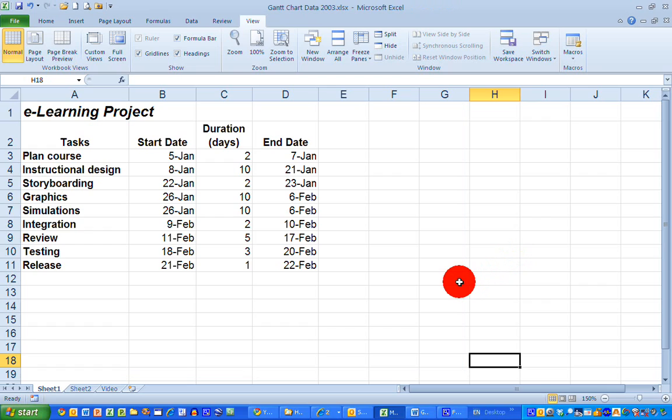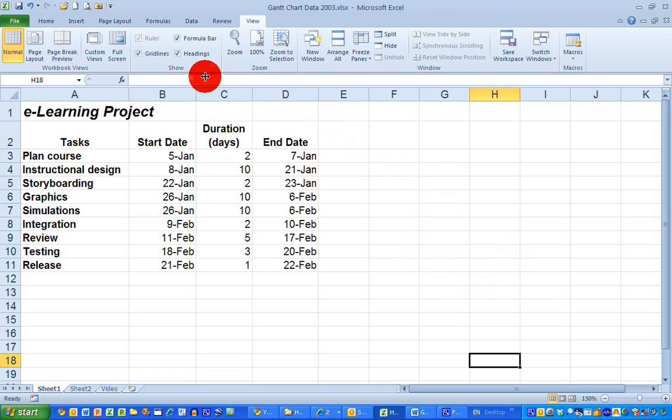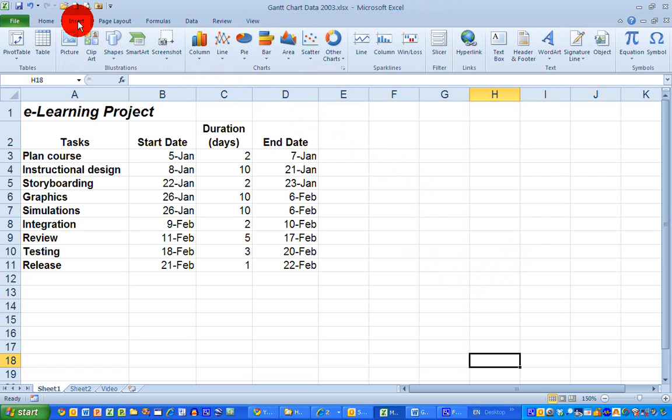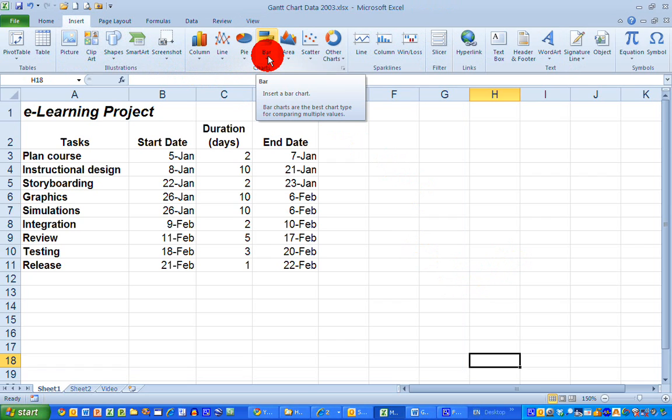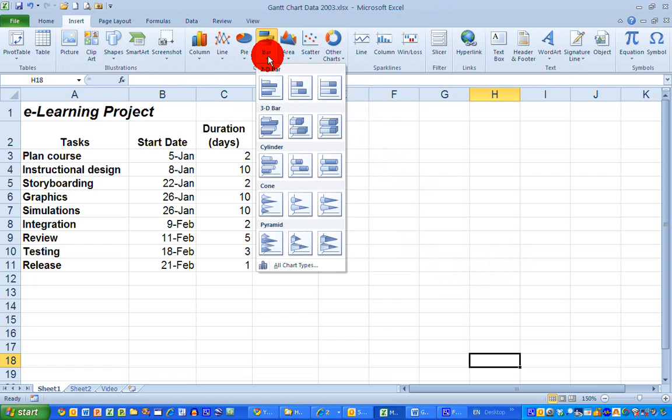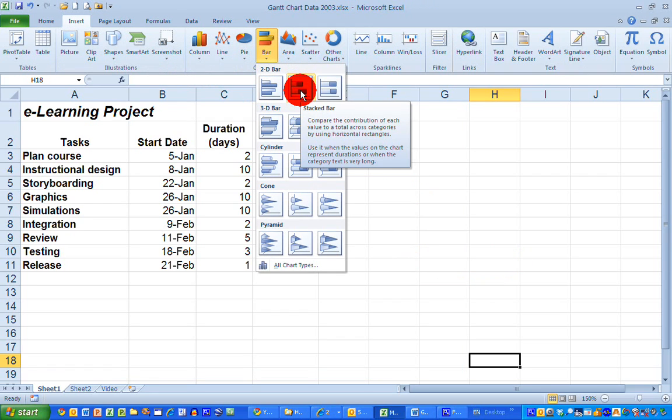So the first thing I need to do is create the chart. Now Excel does not have a Gantt chart option to create charts, so there's a few things we need to do. First off, I'm going to select the Insert ribbon across the top here, and the type of chart I'm going to select in the center is a bar chart, and underneath that I'm going to select the stacked bar chart 2D option here in the center.